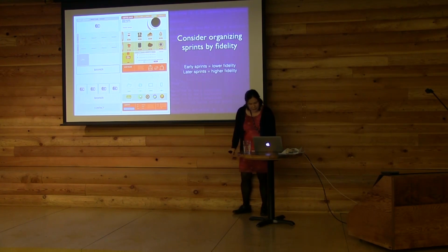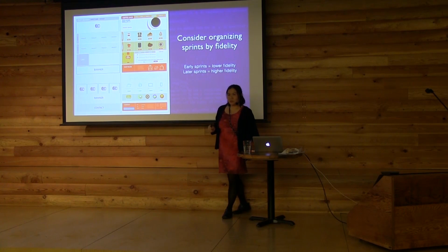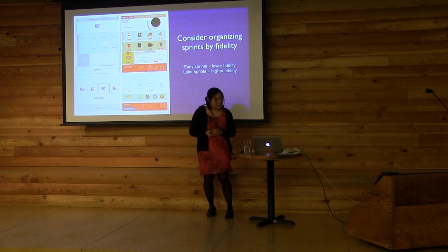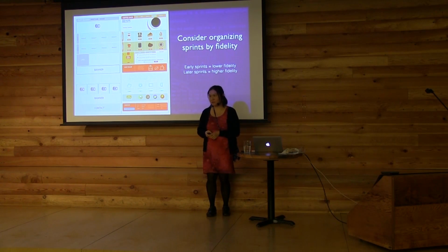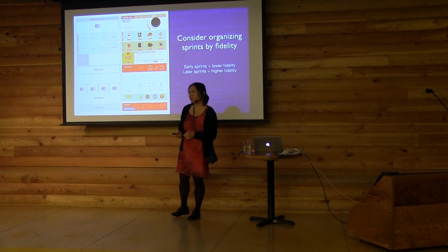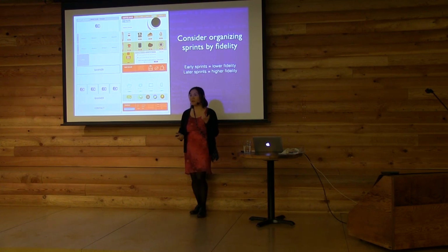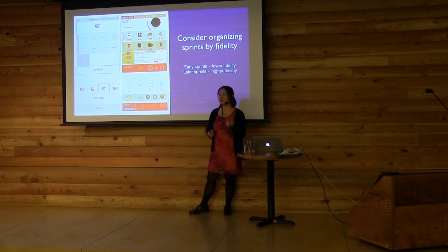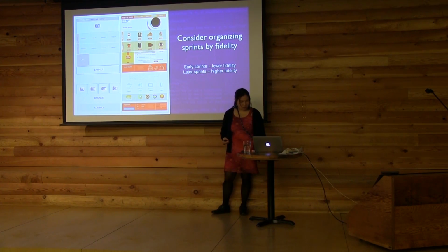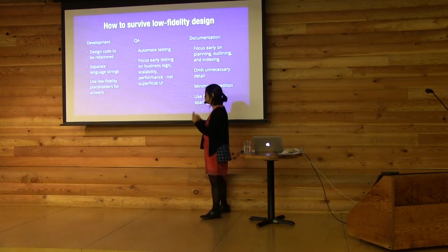So designers usually like to work this way, working with low fidelity first, and your early deliverables might just be early fidelity. It's usually the rest of the team that has a problem with it, okay? Because it's really uncomfortable, especially for QA and for documentation, to not know what the product's going to look like and to not know what the definition of a bug is because the spec isn't telling them that. So it challenges the team to tolerate ambiguity and to tolerate things changing.